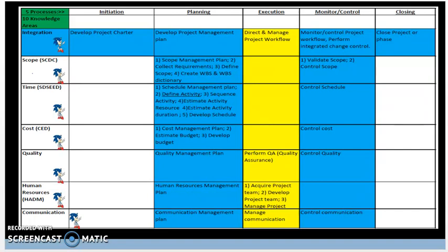Also very important to note is that during the close project or phase process, change requests at this phase of the project are typically frowned upon by the sponsor and other stakeholders in the Change Control Board or Change Approval Board, or CAB. By now, all changes should have been approved or rejected in the Perform Integrated Change Control process here during Monitor and Control.